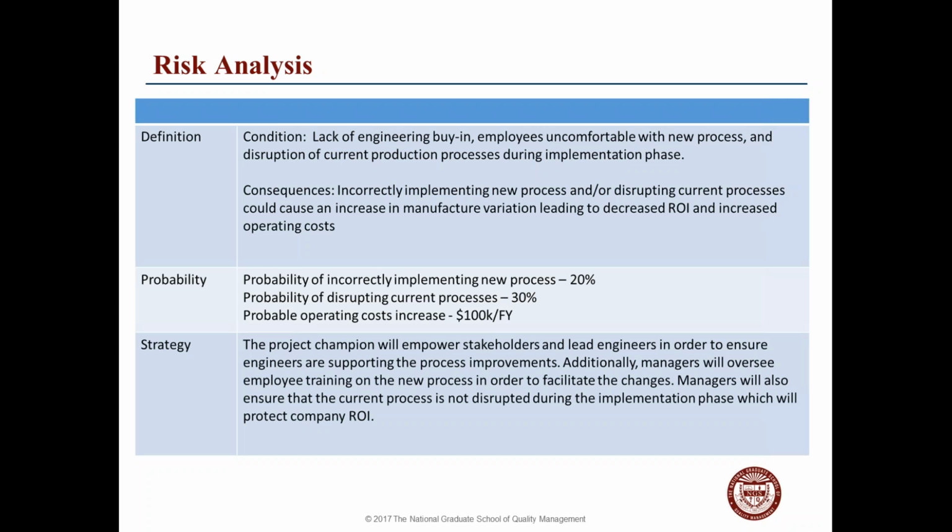Okay, thank you. So with all the good work that we're going to do for our client, we want to assure them that we're not going to make the situation worse. So we pulled together the risk analysis. One of the things that we found out was if we were to start changing things, you know, if we start implementing a process incorrectly, that's one of the risks that we do have, at 20%: the probability of disrupting the current process.